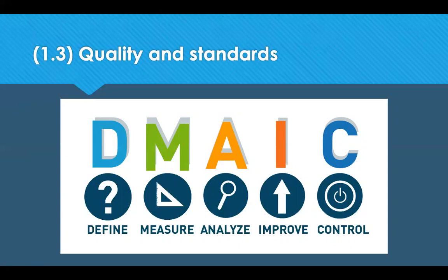So he developed this concept of zero defects, which is where organisations essentially endeavour to produce products that can't be faulted. And it forms part of the Six Sigma process, which you can see on the screen. The steps you go through with Six Sigma are to define, measure, analyse, improve and control. And it's called Six Sigma because it aims to move towards 6 deviations between the mean and the nearest specification limit.